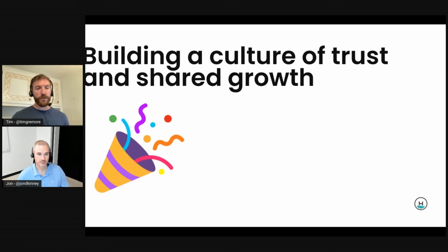So look at your stories, look at what you're planning to deliver, and encourage the team to say, hey, you know what, that looks like it's probably going to carry over. I don't think I'm going to get there for whatever reason, right? Just simply ask, do you see any of these tickets that are not going to make it? Well, proactively move them out of the sprint, move them onto the next sprint, move them into the backlog, deprioritize them, so you're not asking the team to carry around that overhead of, each day, am I going to get to that?